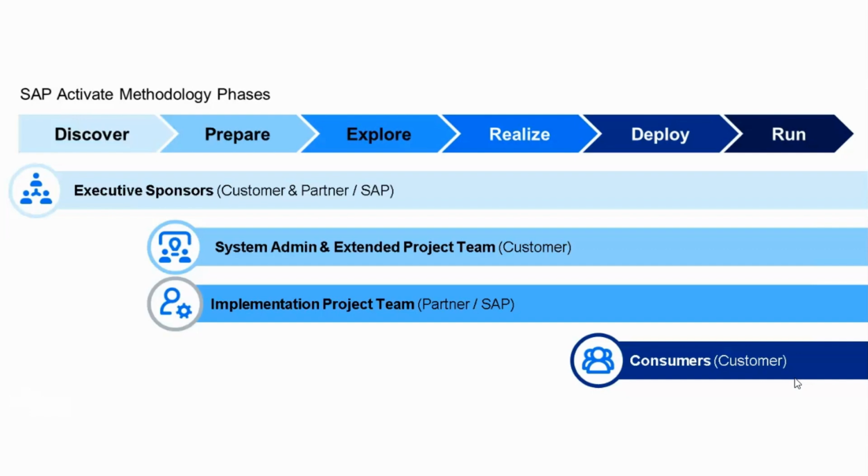A partner or SAP implementation team should be staffed with a minimum of one expert representing each line of business, in short LOB, to be implemented for the customer, a project manager, and a lead configuration expert who will complete the majority of the business process content activation and initial setup activities in the SAP Central Business Configuration tool.